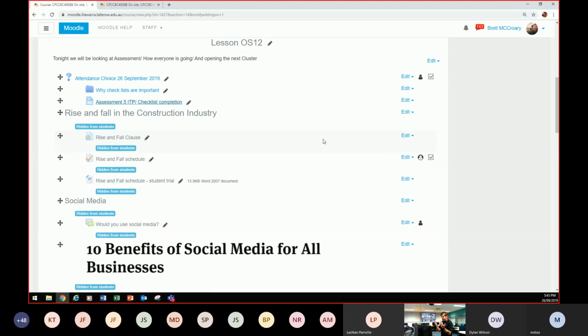No, Corey, we want 2 separate ones. The reason why is an ITP is a more formal document which has the hold points, surveillance points, and what was the other one? Witness points. So that's more of a formal document which shows us that you have an understanding of the ISO quality management system. A checklist is a more informal document that just helps you build properly and get information and make sure you check it off.